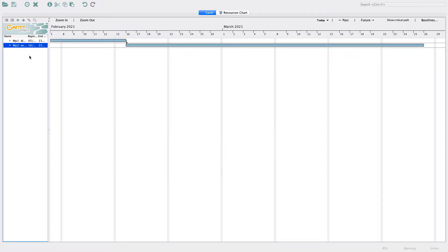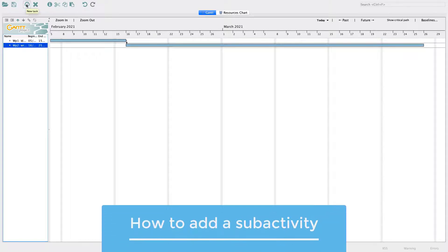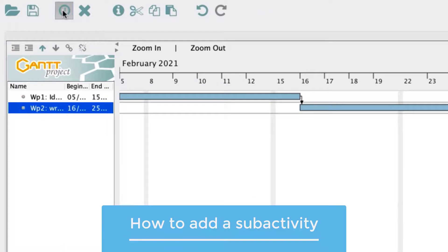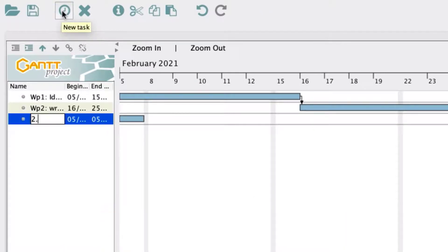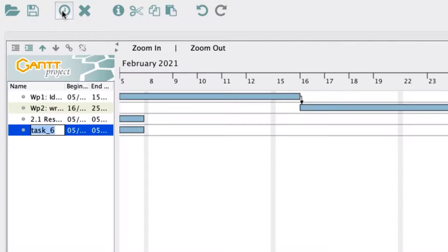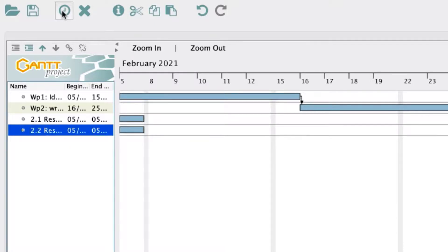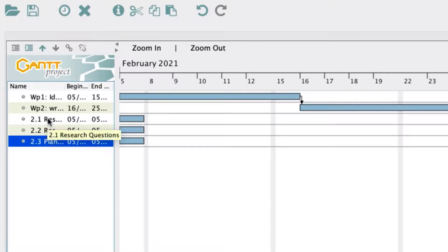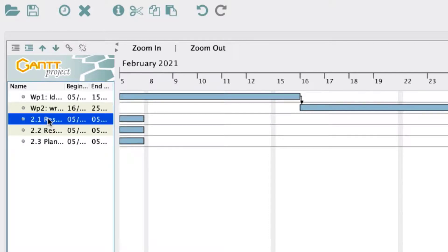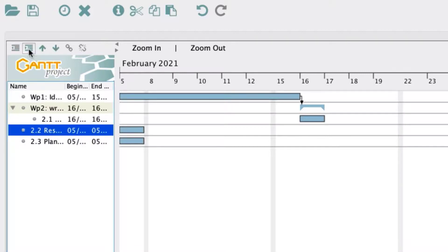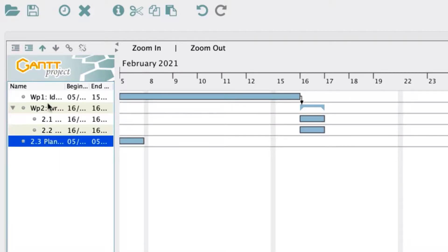In Gantt charts, you can also add sub-activities for each Work Package. Let's do so for Work Package 2. Again, click on the New Task icon and add the following tasks: 2.1 Research Questions, 2.2 Research Design, 2.3 Planning. To make 2.1 an activity of Work Package 2, click on the indent button on the task of the Gantt chart on the left. Repeat this for 2.2 and 2.3.